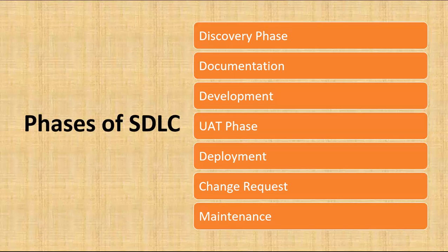The prerequisites are: the UAT setup should be ready, UAT test data should be ready, the UAT environment should be ready, and the business SMEs, like the SME and product owner, should be available, and they should track the complete robot which we have created. So in the UAT phase, the technical team, I mean the development team, the business analyst, the COE team from the RPA, and the business from the business side, like the client, the SME, product owner, or some delivery manager, will be there.